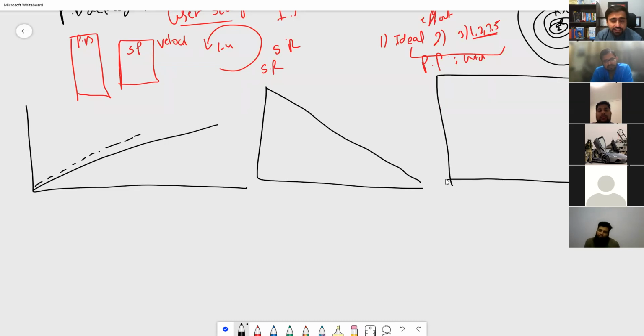In agile, we can have an iteration base or we can have a pull base. Kanban basically works on the pull base: to do, in progress, testing, done. We put a work in progress limit in the Kanban, which limits how much work we can do. Unless we have completed that work, the next user story cannot be put there. So that's the most important thing you must know about agile for your PMP exam.